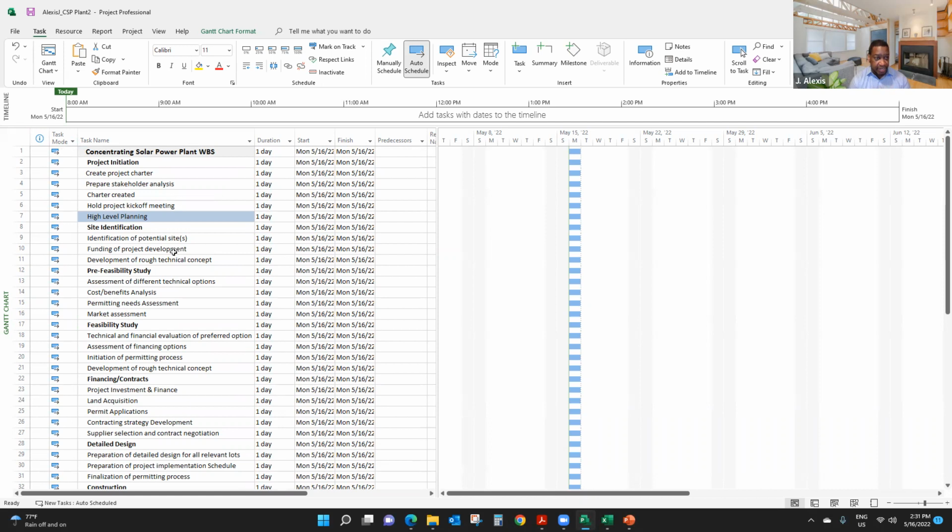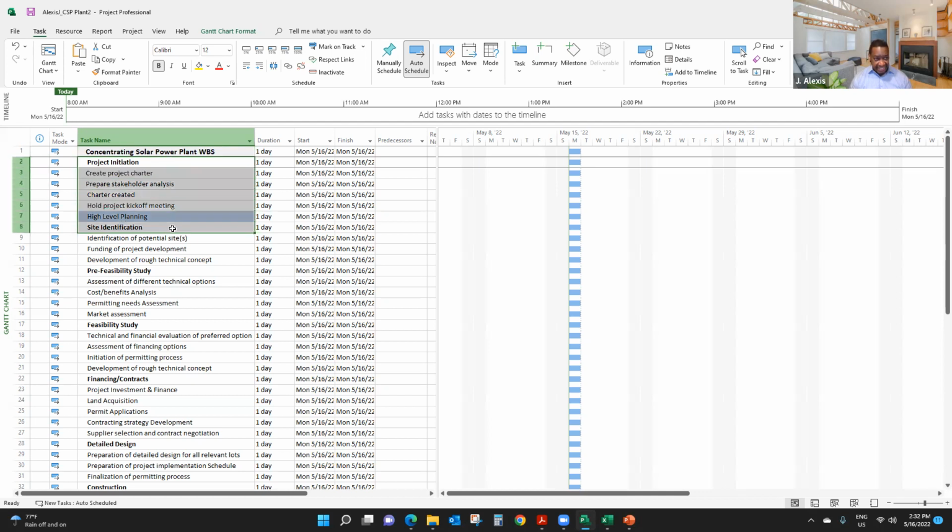And the best way to do that is to take a look at a PMI framework for creating a work breakdown structure. It is a very good framework. It makes everything clear for stakeholders. And the way to do that is to make sure you have a project. The name of the project is the entire project, and everything should be indented under the name of the project.